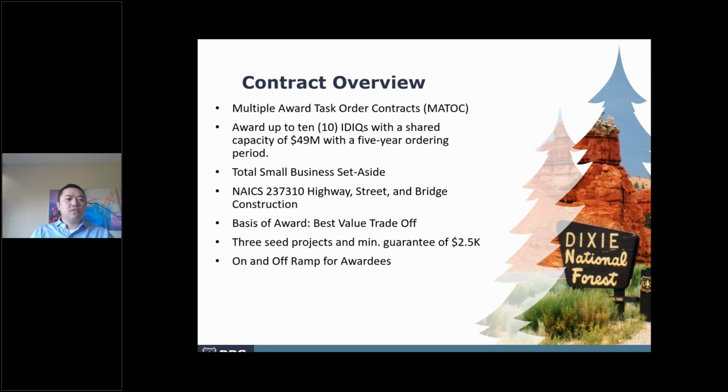Okay, so it's going to be a total small business set aside, because early on in this process, we sent a sources sought out to industry and asked, hey, is anybody interested? We got sufficient response back from small businesses saying, yes, we're small businesses and we're interested. So that's awesome. Because of that feedback, we're able to set aside for small business. So thank you to all those that submitted and helped influence our strategy in that way.